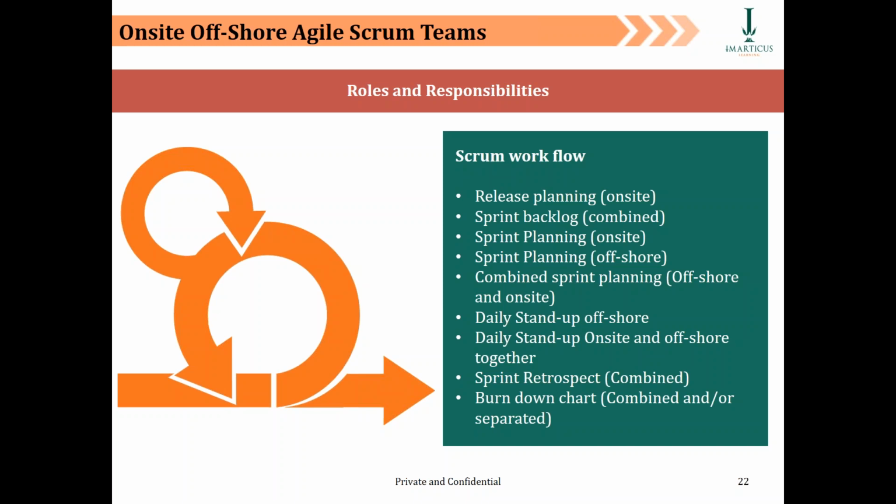Reason? Because the onshore team is clearly sitting along with the product owner and can align best in terms of what configuration or changes the business needs at any point of time, which means sprint planning can also be done largely sitting next to the product owner. If that is the case, guys, then all those activities which need the product owner in proximity have to be done on site, and hence release planning is on site, sprint planning is on site. All right, because these are the two key activities which need clear participation from the product owner.